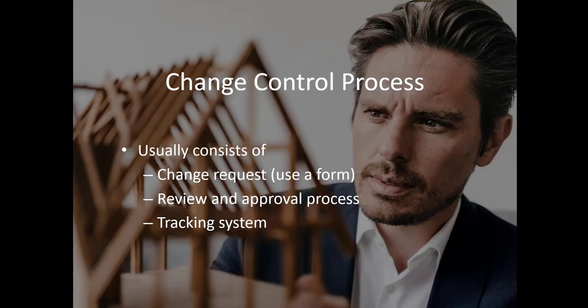So let's talk about that process. Anytime you need to make a change to your plan, you must start with a change request. This is a document that either you or the person making the request must complete. Any change to your project must be documented so you can figure out what needs to be done, by when, and by whom. It's very common in construction to call this an RFI, or request for information. These are usually logged in a database somewhere. Sometimes they're done through emails if it's a very small job, but on most modern day jobs, it's a formality that you're going to do.